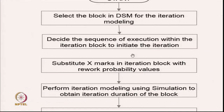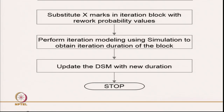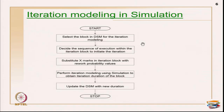Perform the iteration model using simulation to obtain the iteration duration of the block. Once this is done, update the DSM with the new duration and then stop the whole exercise. Now, what is the meaning of block execution? I am going to take a hypothetical example and show you the real meaning of blocks.